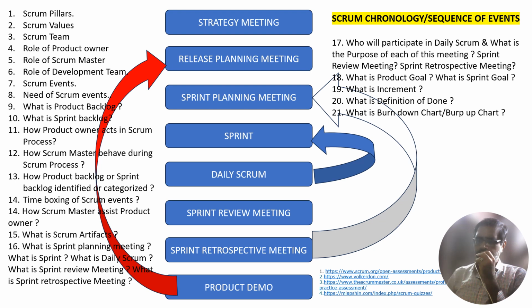Scrum requires a Scrum Master to facilitate an environment where the product owner orders the work for a complex problem into a product backlog. The Scrum team turns a selection of the work into an increment of value during the sprint. Third point, the Scrum team and its stakeholders inspect the results and adjust for the next sprint. And finally, the Scrum Master is required to report on these Scrum events or Scrum details, right?